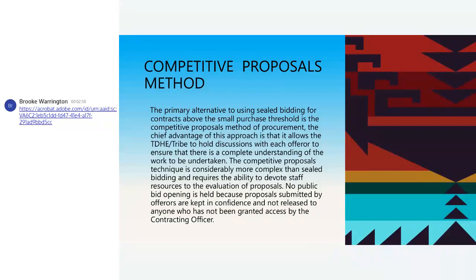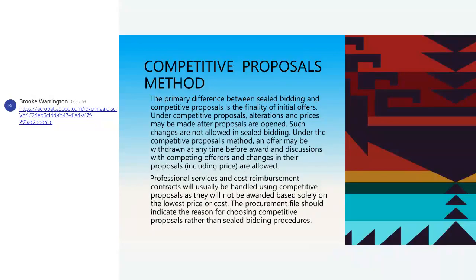Your competitive proposals technique is considerably more complex than a sealed bid and requires the ability to devote staff and resources to the evaluation of those proposals. Proposals submitted by your offerors are kept in confidence, not released to anyone who has not been granted access by your contracting officer. The primary difference between sealed bid and competitive proposal is the finality of those initial offers. Under competitive proposals, alterations in prices may be made after your proposals are opened. Such changes are not allowed in sealed bidding.